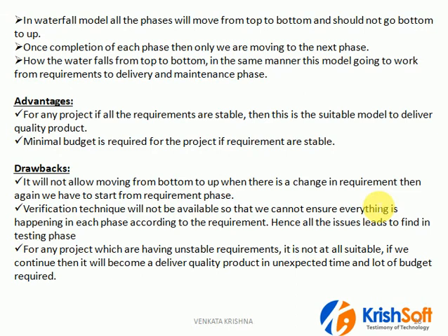That is the reason all the issues are found only in the testing phase. If you identify so many bugs in the testing phase, what will happen? The cost of the bug fix will be more, because once you identify the bugs, again it needs to come from requirement, analysis, design, coding, and you need to test it again, because there is no bottom to up, always top to bottom only.